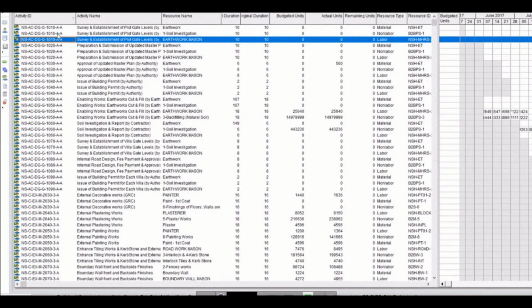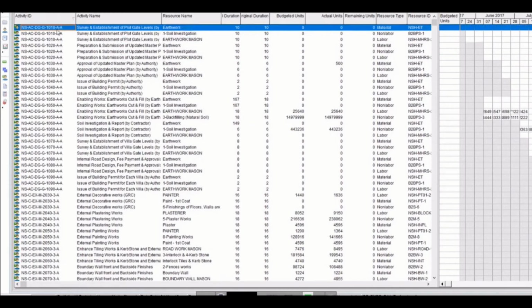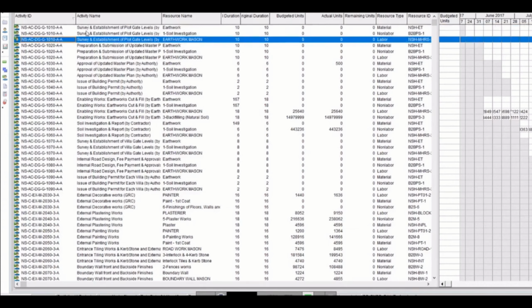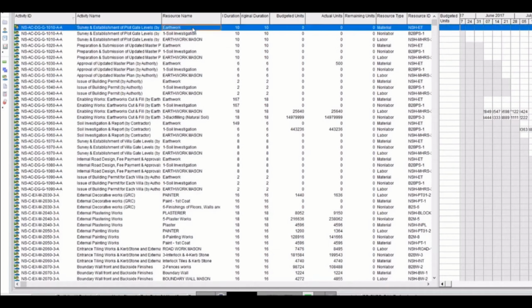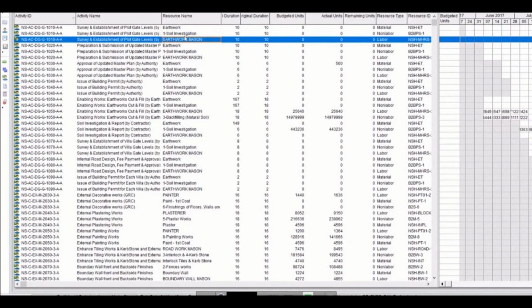Why? Because activities, there are three types. This activity is repeating 3 times. So if P6 gives you the status tab here, and if you by chance change the status to only one, let's say it was not started, you changed here to in progress, or completed, and you did not change the other two, what will P6 do? P6 will not understand what to do, because one part says it is completed, the other two parts are not similar, they are different. So P6 will be confused.